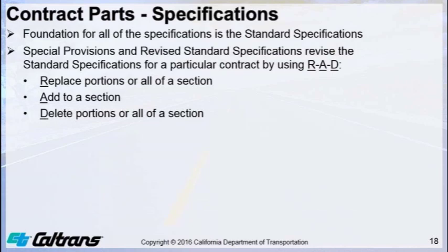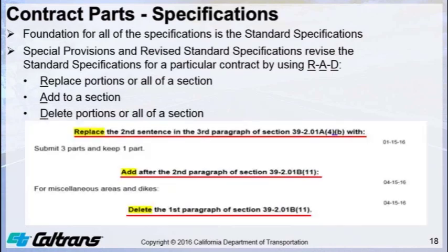Both use the RAD method, which is replace portions or all of a section, add to a section, delete portions or all of a section. A revision clause shown at the top of each revised standard specification and special provision describes either replace, add, or delete specifications. An example on screen shows three revision clauses for replace, add, and delete.